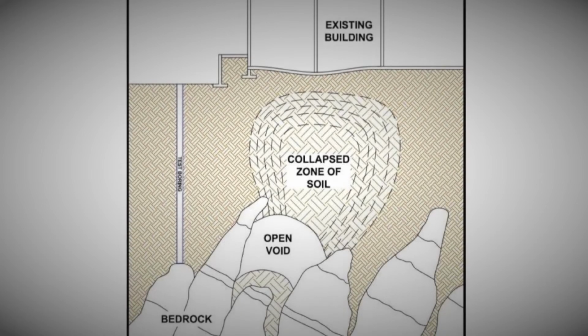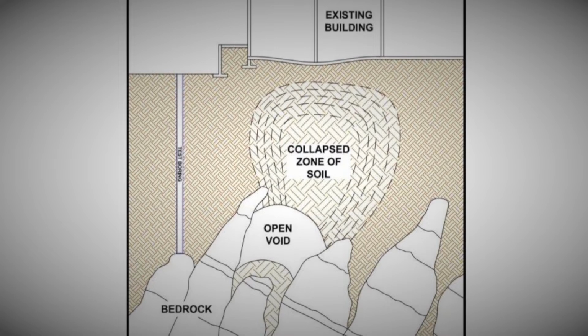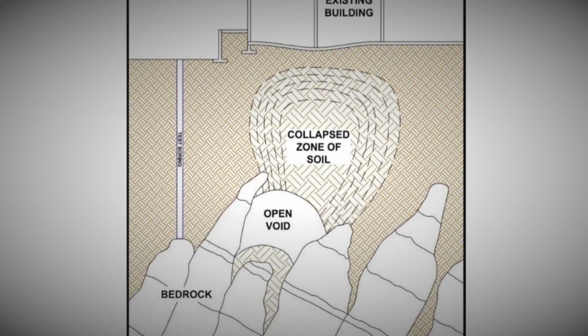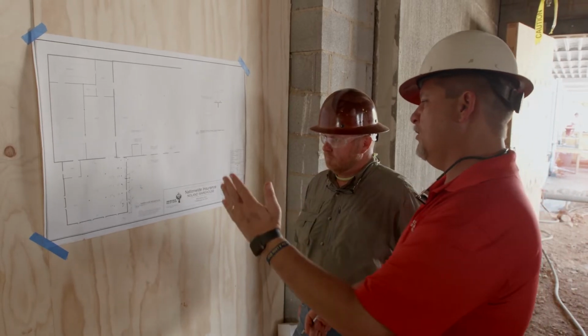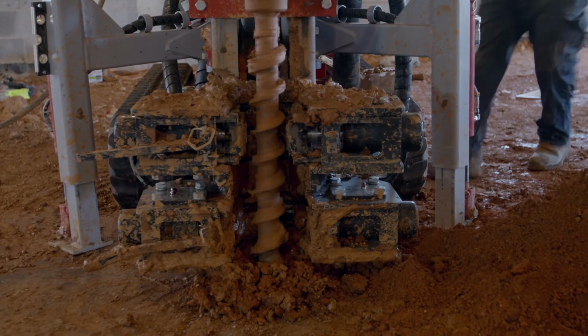Geotechnical explorations determined that there was a very large sinkhole below the earth at about 30 feet, which wound up being as deep as 90 to 100 feet after all explorations were done. The process began with doing a piering system to mechanically stabilize the structure itself.